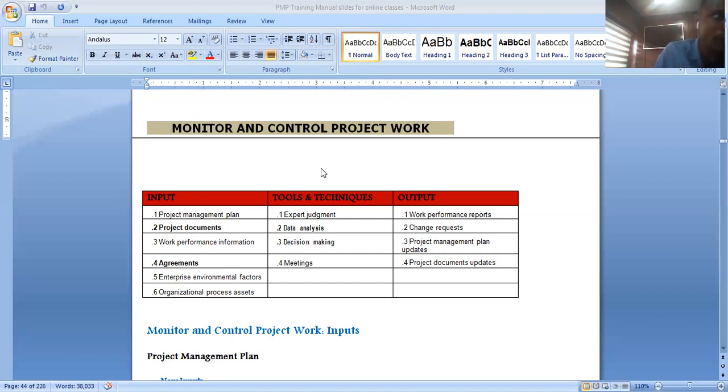And then it is the work performance information. You may not be there. Your personnel will be telling you that, Oga, we have placed 24 blocks. And you look at the time. Them telling you that they have been able to lay 24 blocks means that they are passing the work performance information to you. And the work performance information will be gotten from the work performance data. And from the work performance information, you will embed it in your project status to be able to tell the client, we are well, we are doing well.